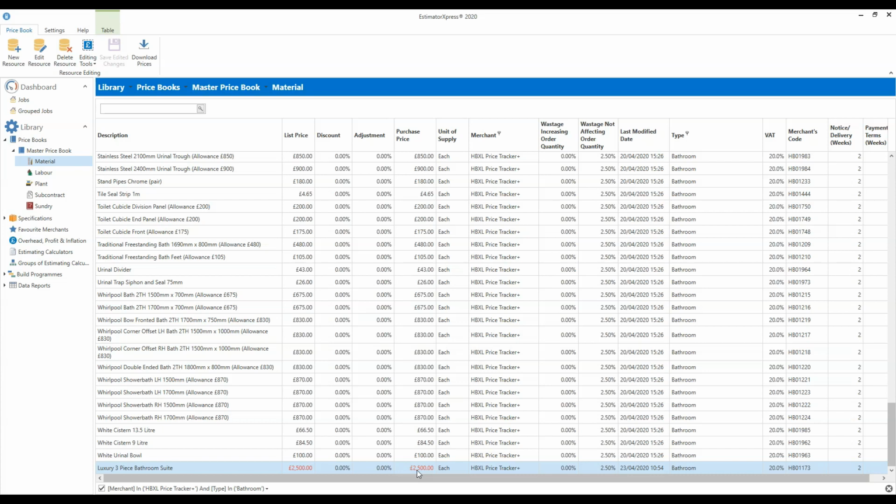Okay, so Paul, I'm just reading your note here. You're saying with an item as we've just discussed, the bathroom suite, it's a supply item, so you just normally buy in for the customer and there's a 10% markup rather than, say, a 30% markup, which we apply across the estimate. Okay, I'll ask Tom to advise on that one. What's the best way? If there is a workaround with that. Okay, so I'll come back to you on that one.